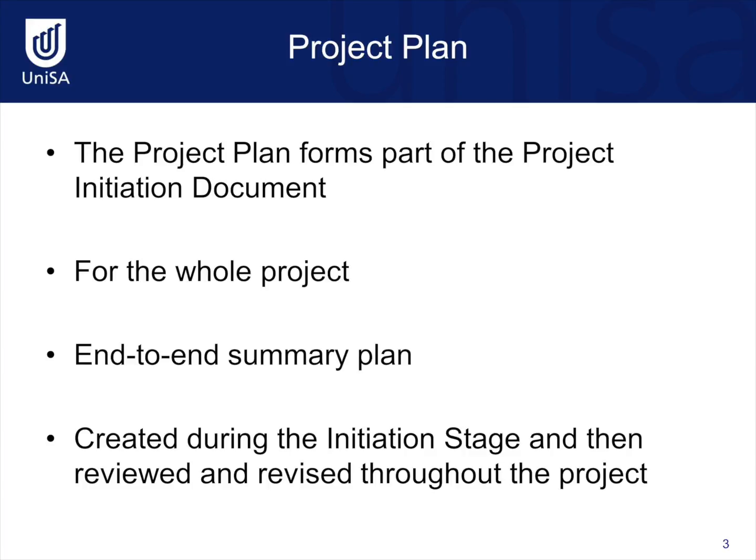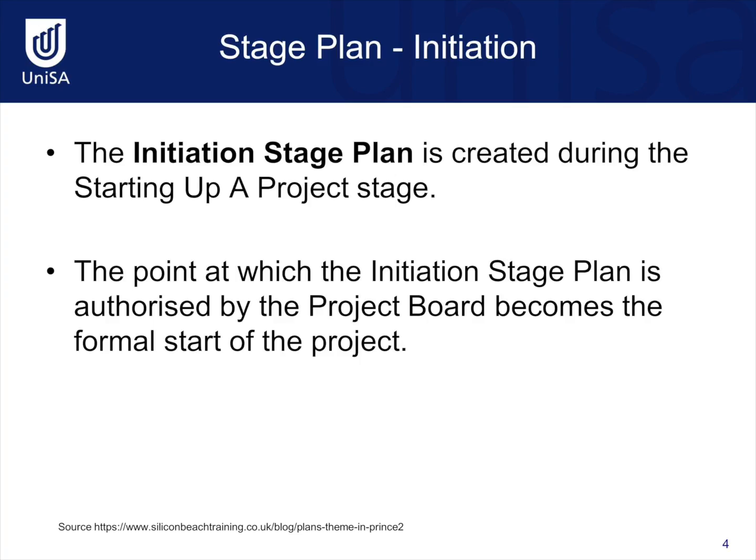So the project plan is something that's created at the beginning in the initiation stage, but it should be reviewed, revised, and maintained throughout the duration of the project. We have a project and we break a project up into a number of stages. We then need to plan each of those stages. For the first stage, we create an initiation stage plan, which is created during the starting up a project stage. Once finalised, the initiation stage plan goes to the project board for authorisation. This then represents the formal start of the project.